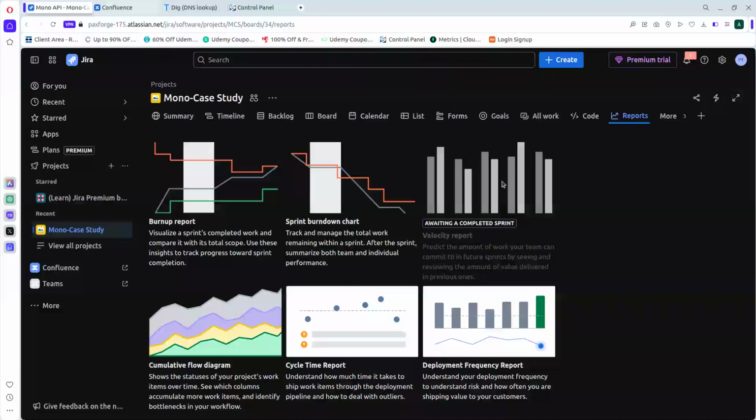If the team keeps committing 50 points but only delivers 30, for example, maybe the requirements were too vague, or maybe everybody has so many things they're doing outside the class. Of course, by the time we complete the sprint, you'd see the outcome of the velocity report and see that we are really lagging behind.